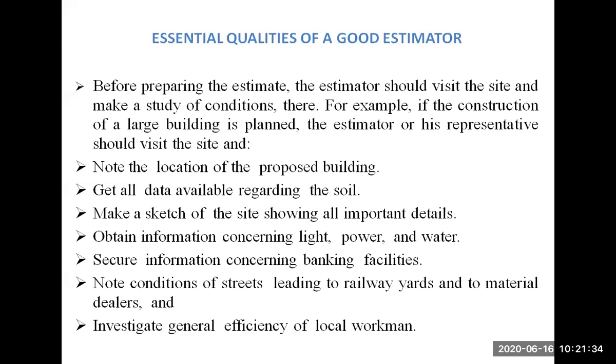All such basic tests that you performed in geotechnical engineering, this data should be available with you before starting any project. That means you have to visit the site, take the samples, test the soil samples, and then you can say, yes sir, these are the soil conditions. Based on the soil conditions, this is my style of construction and the type of footing that I am going to adopt. It may be shallow or deep foundation, whatever it may be. But soil testing and other material testing is a very important parameter for any particular project.